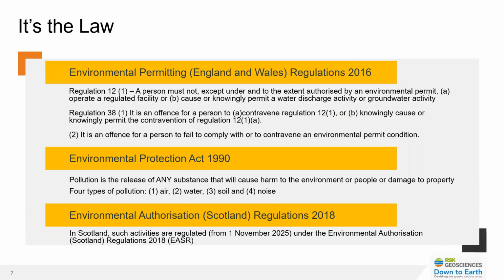One of the most commonly confused aspects associated with site discharge is that people assume that a Section 104 agreement that's been agreed through planning constitutes consent to discharge construction surface water, as ultimately the 104 agreement relates to the completed development, i.e. post-construction. So in terms of EPR, there are two key regulations, Regulation 12 and Regulation 38, that relate to the discharge of construction surface water.